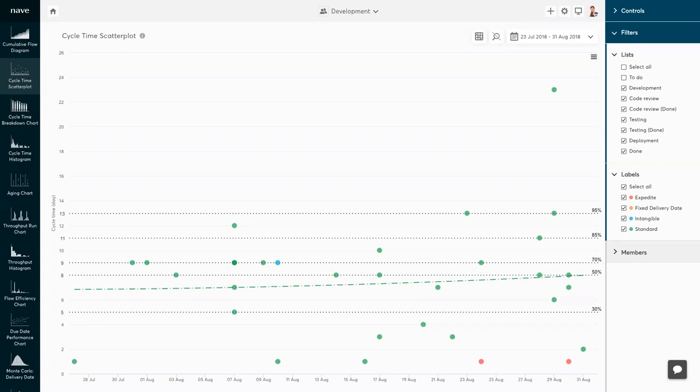The percentile you use to define SLAs largely depends on your context. You and your customers may be happy with 85% certainty, or you may both need a higher confidence level. You can also filter your data by class of service — the 85th percentile for fixed delivery date tasks will likely come with a different cycle time than the 85th percentile for expedites, for example. That way, you can provide different SLAs for different work items you are committing to.